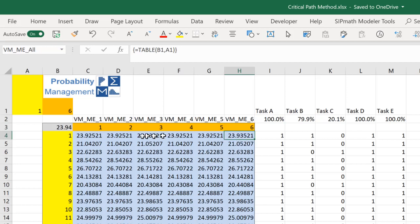However, when I apply an epsilon to task A, it drops by 0.01. Same for task B, but not for task C. And it does drop for task D and E.